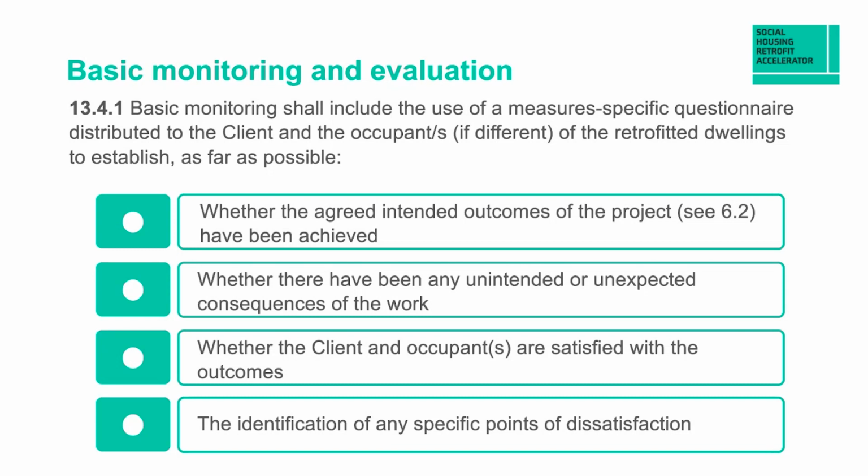And I've worked on some Energiesprong projects where they've taken 6 months to complete. I mean, they were done in COVID, so they probably took longer than they needed to because of that. But the residents were obviously really quite upset about the length of time that they had people in their house because it was a whole house retrofit. It was incredibly disruptive to them inside and outside, and they were very unhappy with the whole process. But when you went back a year later and you asked them how their homes were performing, they were really positive about the outcomes of their properties.